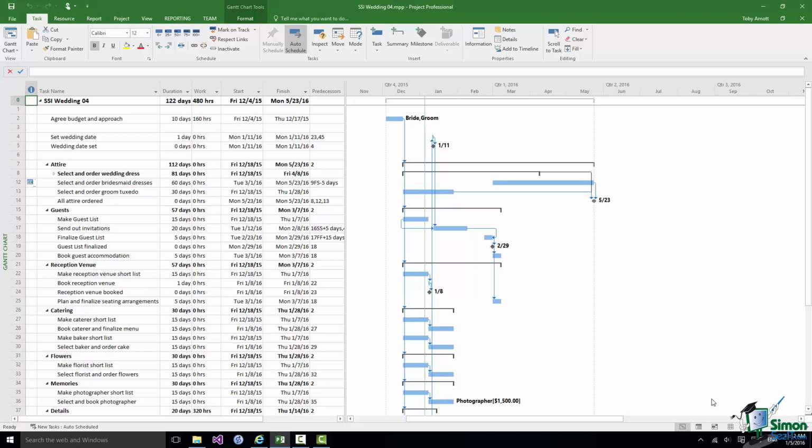If you wanted to take a plan such as this one and schedule it manually, there would be nothing to stop you. Now what I mean by scheduling it manually is that you choose exactly which task starts on which date, and you check that you've got the time to do it, that the resources are available, that your constraints and deadlines are met, and so on. So you can pretty much handcraft the whole schedule. Now in some situations you may have projects where that's exactly what you decide to do, but with a large project with a lot of resources and many constraints, dependencies, etc., that will be a very big job.